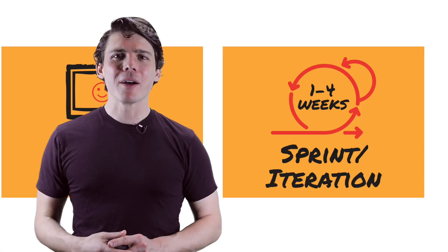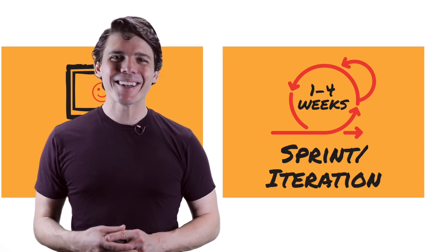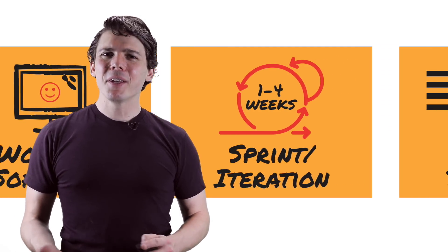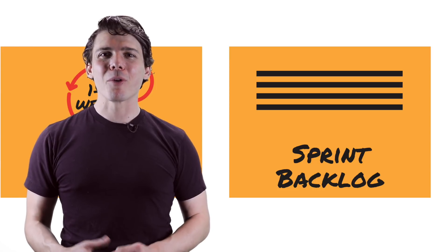Based on my experience coaching dozens of teams, I now suggest one to two week sprints. Three to four week sprints don't allow teams to iterate quickly enough and allow for nasty anti-patterns to creep in.